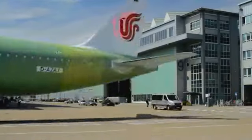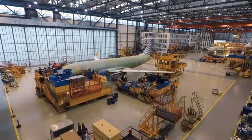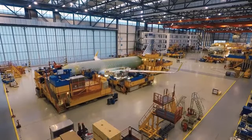When we started manufacturing aircraft here in Hamburg in 1992, we were at a takt rate of around 5 or 6 days per station per aircraft. We have 8,500 aircraft already built and a huge backlog of aircraft ready to be built, and really our customers need their aircraft. So we permanently look for new ways of working, for new technologies, increasing our number of final assembly lines and increasing how fast we move the aircraft from one station to the next. We are currently at a rate of 2 days per aircraft per station, and as you can imagine, these aircraft rapidly move along our flow line until they're finished.